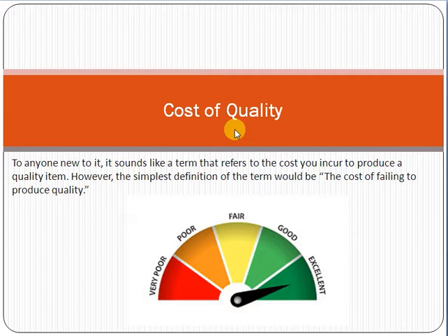Remember one thing, quality means delivery of the scope, delivery of requirements as per the signed scope of work to the customer. Always remember that if you are delivering anything which is not part of the scope of work, and you are giving some additional feature or functionality just because you think it will add some value, however it was not agreed with the customer, this is called gold plating, and it is totally unallowed, totally unacceptable as per the definition of PMBOK or PMI. This is totally unallowed in project management.